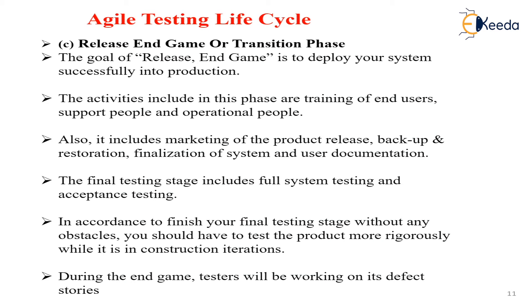Then we have the Release, End Game, or Transition phase. This means deploying your system successfully into production. This activity includes training of the end users, support people, and operational people. The end user is the customer, support people are those who help with the product, and operational people help you work with it. It also includes marketing of the product, release, backup, restoration, finalization of the system, and user documents - manuals, help guides, and related websites.